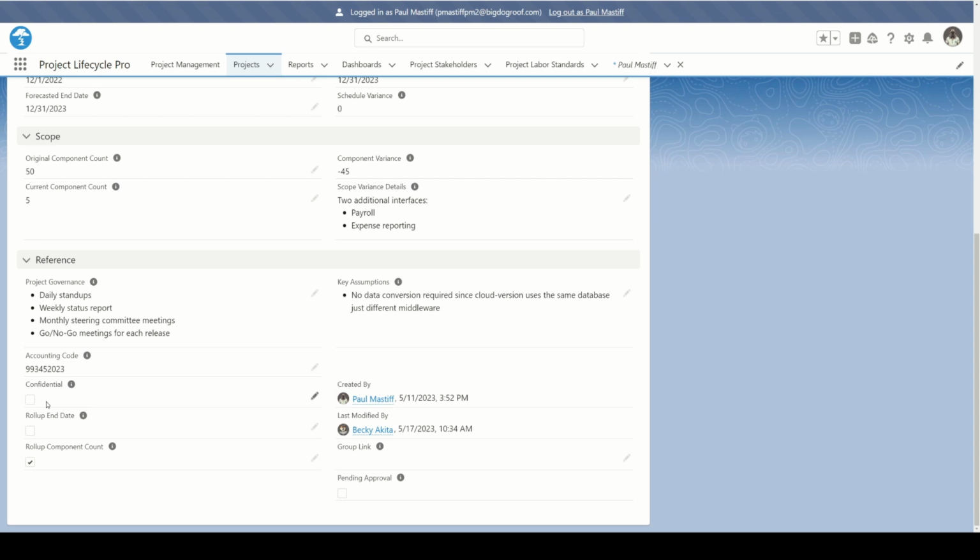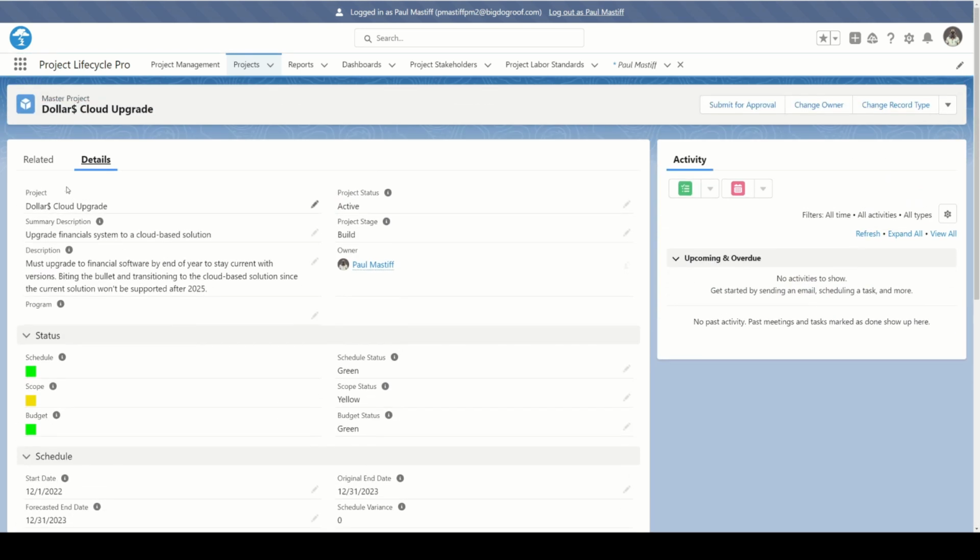However, the default is that public users not on the project team can view the project information, but cannot view financial information. Only project team members can be given access to the financial information. So if somebody needs access to the financial information who's not on the project team, you need to add them as a role on the project team. You can add them as a stakeholder.